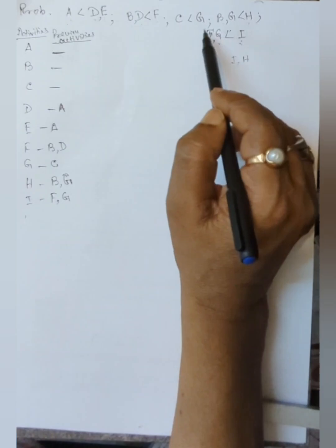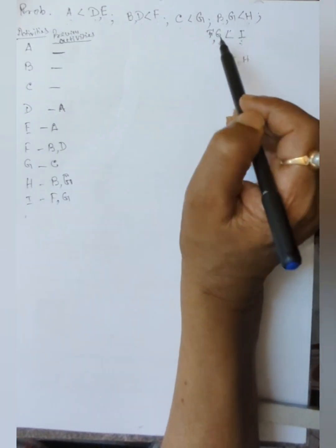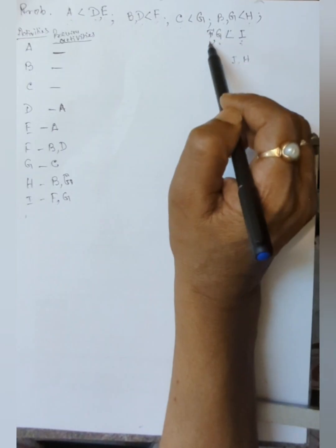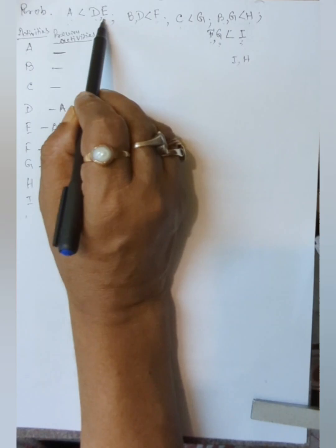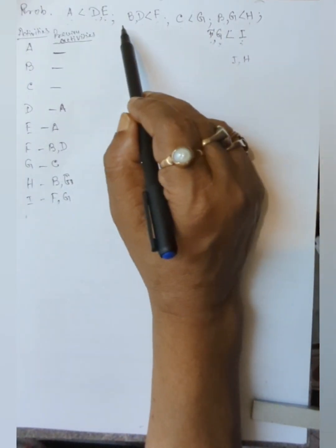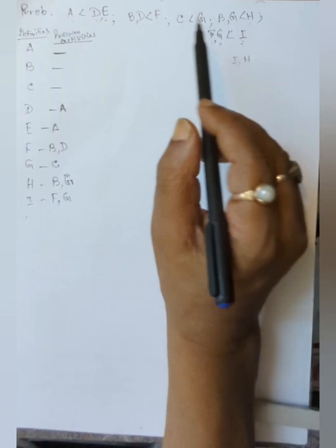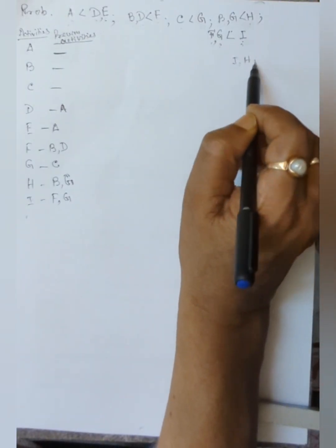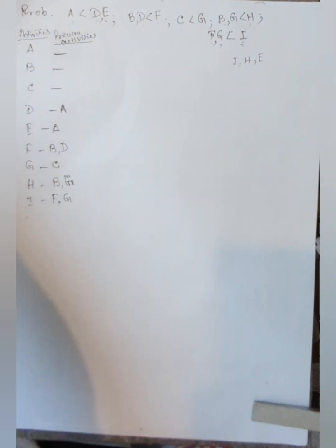C is a starting activity, so it will not come. F is here; it has to be completed before you start, that's why it is not a terminal activity. E is a terminal activity. You see, there is no relationship saying E has to be completed before any other activity. That's why it is a terminal activity. So I have given some idea of how I will proceed to start.